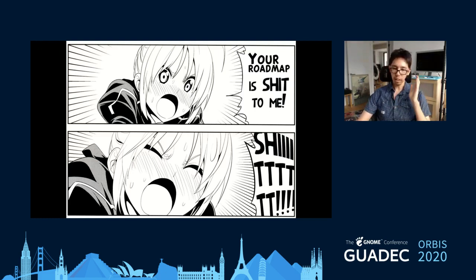And there you can simply and only target things to a milestone when they are either already fixed or when you have someone who is actively working on a fix or has assigned themselves to an issue with a believable promise of solving the issue soon. Never target issues to milestones otherwise; leave them fluid and up for the taking. Don't have more than 2 milestones because nobody sees that far into the future. And use labels and priorities in a very specific way. We'll get back to that later in this presentation. If you look at the GTG roadmap page, I will candidly say it's the most honest software project roadmap you've ever seen. It doesn't commit to features and time frames because it realizes that you are wholly dependent on benevolent contributors to make that happen.